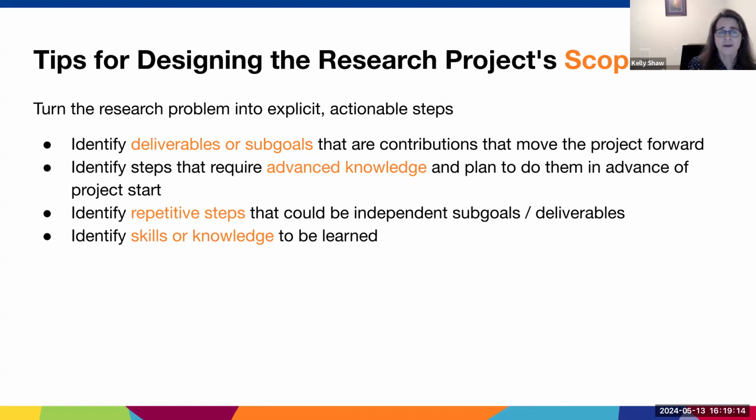Now, I'm also going to recommend that you identify repetitive steps that could be considered independent sub-goals or deliverables. And the reason we do that is to enable that flexibility of the timeline so you can expand or contract the work that's going to be done based on the actual dynamic experience you're having.